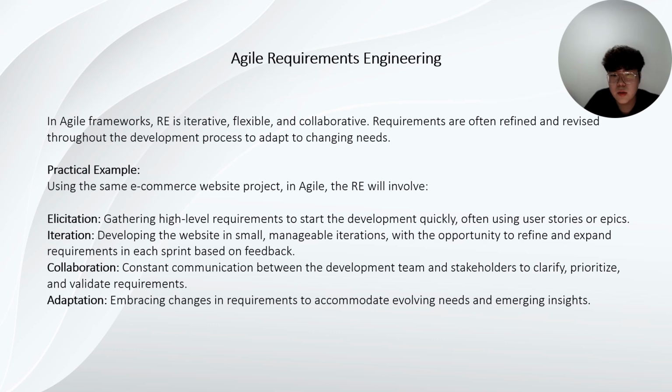Using the same e-commerce website project, in agile, the requirements engineering will involve elicitation, gathering high-level requirements to start the development quickly, often using user stories or epics. Iteration, developing the website in small, manageable iterations with the opportunity to refine and expand requirements in each sprint based